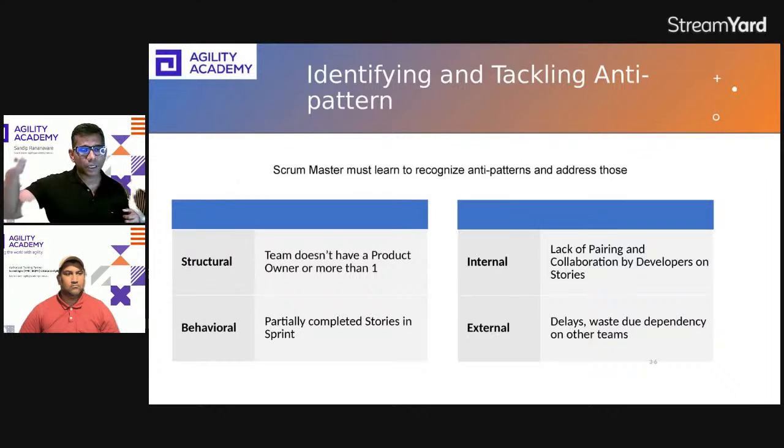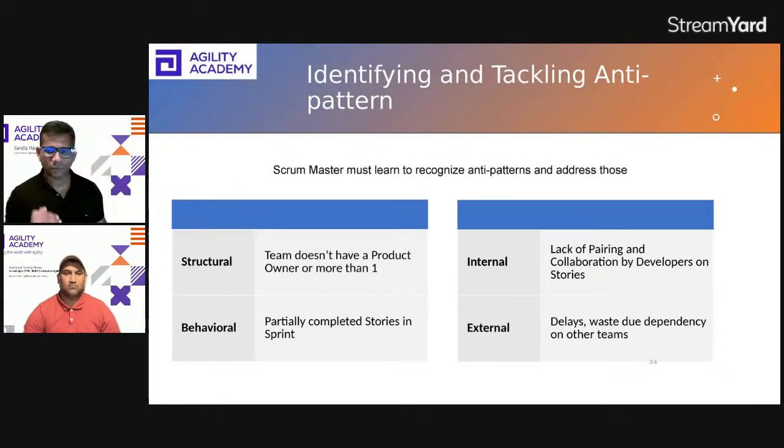That is your epic. You can have an enabler which impacts one release train, like 5 to 12 agile teams, and requires contribution by each of those. That can be your enabler feature. The time box for that is 1 quarter maximum. And then you can have enabler stories, which are small changes to be done by one team, and can fit within a sprint. That's how you can look at it. But irrespective of that, product owner, Scrum Master, you need to ensure that this is top priority and worth investing time in.